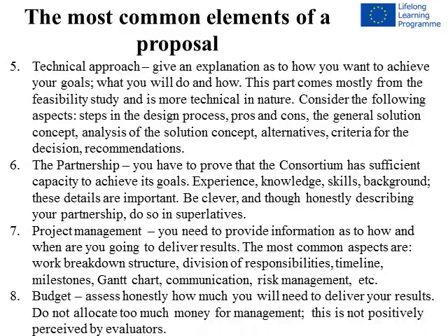8. Budget. Assess honestly how much you will need to deliver your results. Do not allocate too much money for management. This is not positively perceived by evaluators.